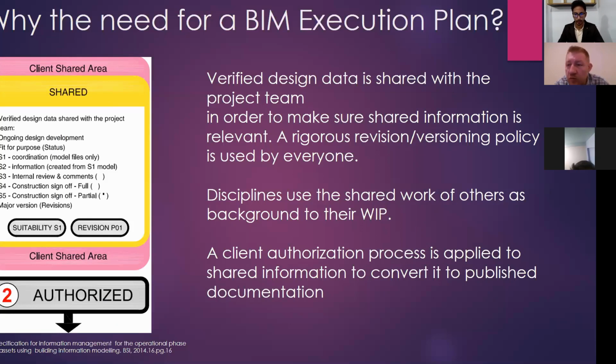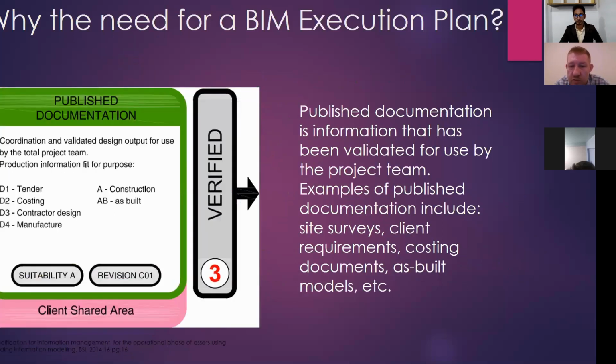Now, the moment all this information is cleared, then you have the type of door you need, the location of the door, length, width, and all the different elements of the door, then this becomes what we call authorized documentation. And the moment that the door is installed and we have as-built documents and it's verified that that is the door that you need, then this will go into archive.